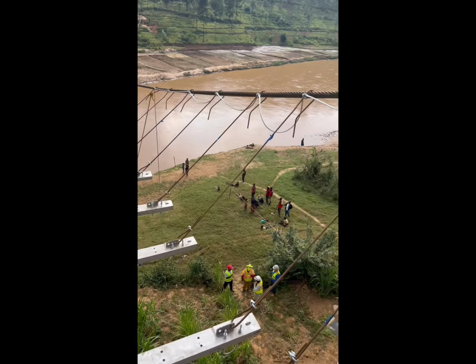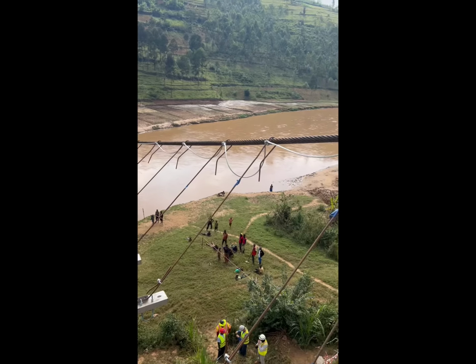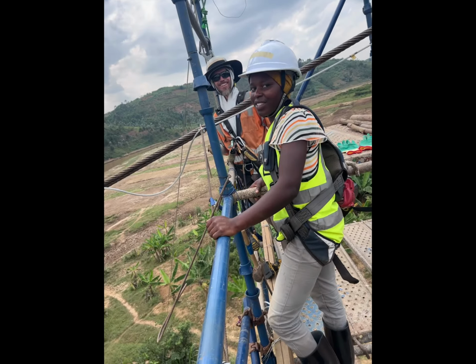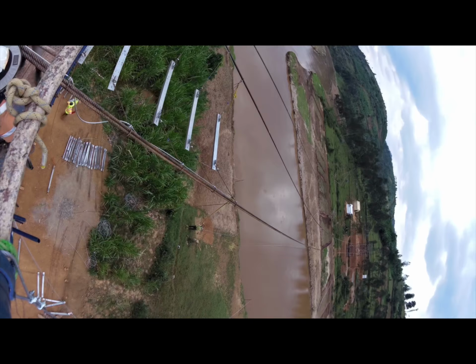We roped them from the bottom, pulled them up, got them hooked onto the suspenders. We actually couldn't erect the first few that are in the middle because we would have to pull them apart too far to reach the suspenders. So we left the middle ones out, which we would erect later. They were short enough to do that when we were out on the bridge.